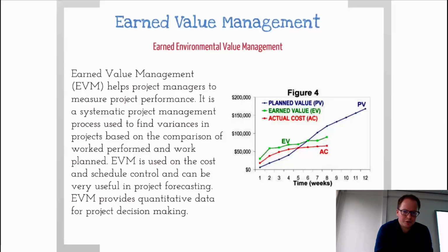It's normally used by the project manager to measure project performance. Yeah, we had that in the other session. Be warned, earned value has a bias level. It depends when you're measuring. It can be a small change, as small as a day. Accounting a project that is nearly completed as completed can make a big difference, or an activity or work package that has not yet been completed. It's very tempting to already fully account against it, which actually really changes the value in the illustration, right?